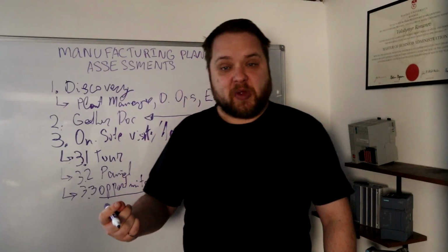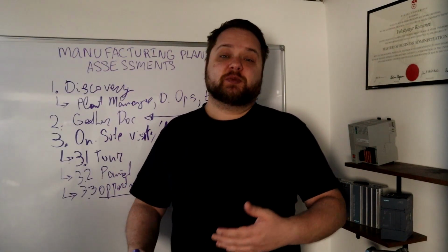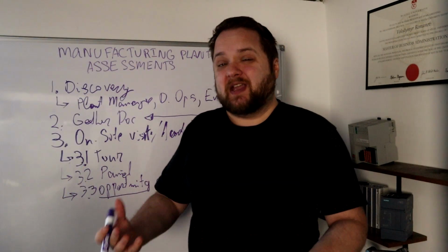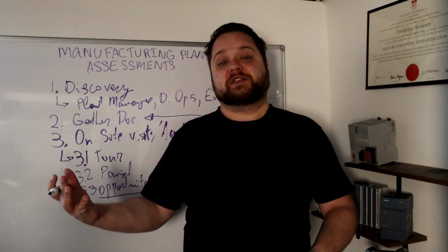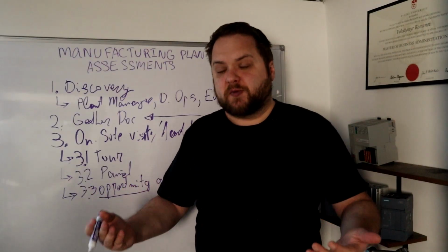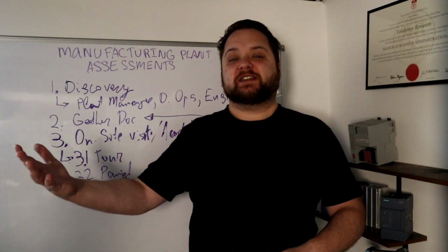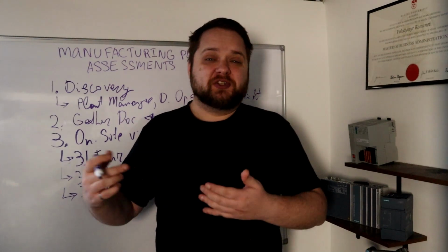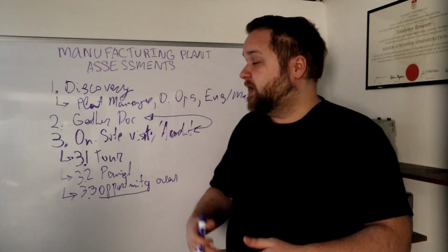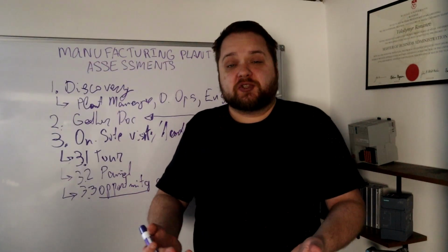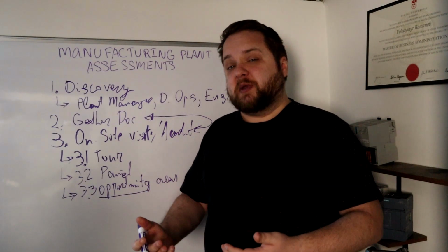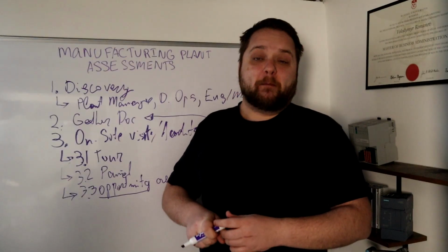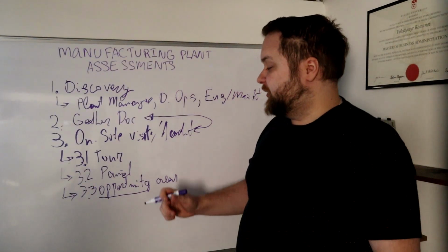We want to create a map at the end of the day of all of the assets, instrumentation at the PLC, HMI, SCADA, and MES layers. We want to understand any data flows. A lot of times I would show up to a facility that's using an obsolete system like RS-232, and it's talking to a lot of different PLC-5s in the field over Data Highway Plus. You want to understand where those nodes are, what they're doing, how much of that is important to the facility, what they actually look like, and capture the images with the part numbers, because ultimately you will be providing that information back to the customer and relating what needs to be done to modernize and fix some of the issues that they're going to be facing.